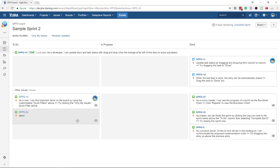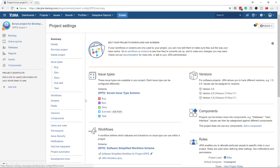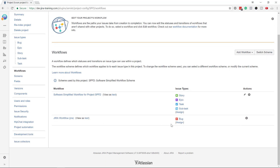The purpose of this is that I'd like to use a non-simplified workflow for the Bug type. This is a little bit confusing, especially if you want to improve your workflow by removing steps — it is actually not that simple. If you want to remove something from an active workflow, JIRA is not going to let you do it. Let's go into the project settings. As project administrator or system administrator, go to Workflows — I've managed to add an additional workflow for Bug.